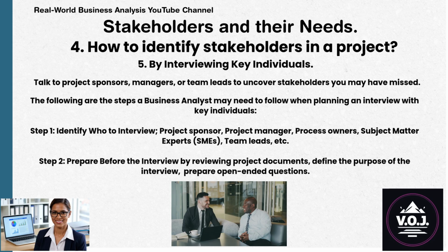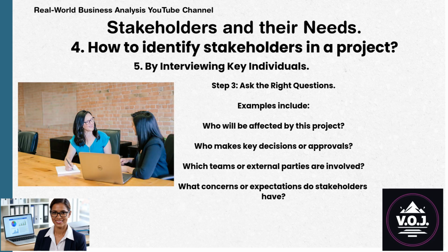Step 2. Prepare before the interview by reviewing project documents. Define the purpose of the interview. Prepare open-ended questions. Step 3. Ask the right questions. Examples include: who will be affected by this project? Who makes key decisions or approvals? Which teams or external parties are involved? What concerns or expectations do stakeholders have?